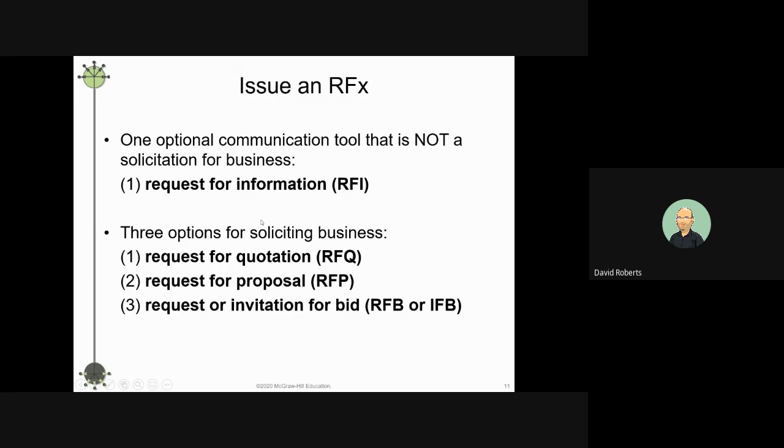Right. So again, RFIs, RFQs, and RFPs, depending on what you're looking for. If you already know exactly what you want, then you can get an RFQ. If you're not quite sure, let's say you want a new military vehicle, you may say, these are some of the criteria we have, come up with some proposals for this.